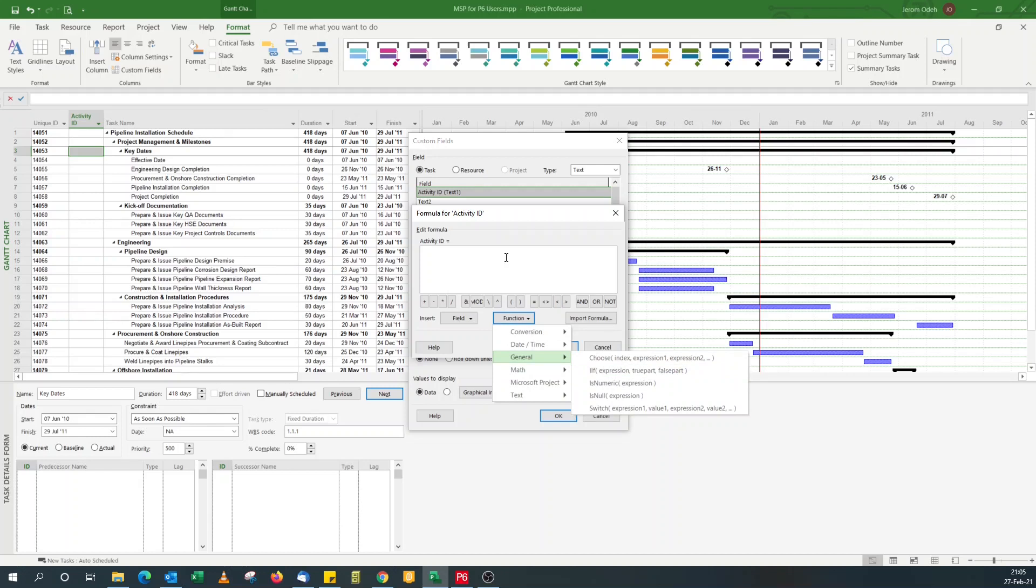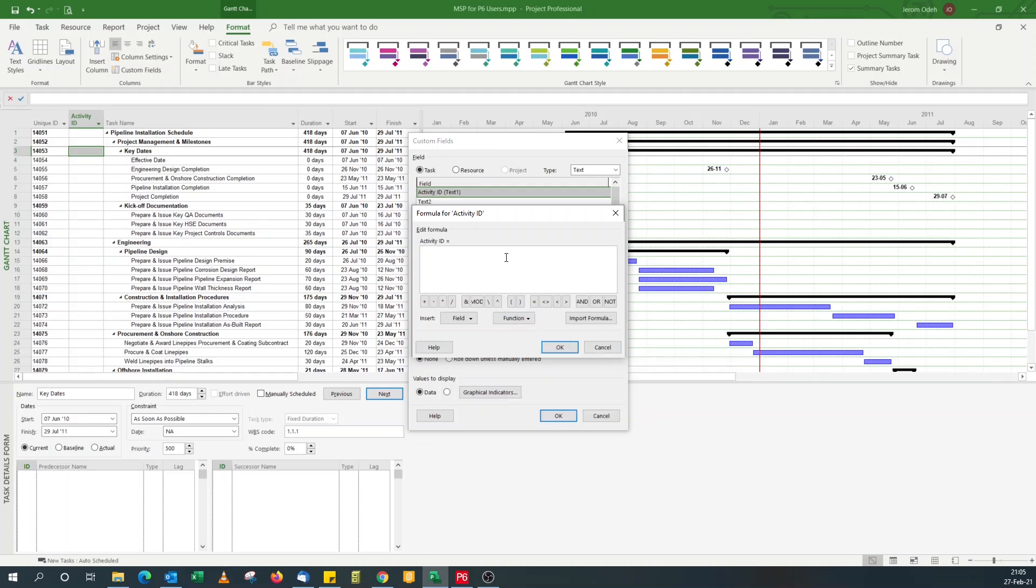If function, combine them with either outline codes or other custom fields to do it. For this tutorial, I'm going to keep it simple. Just one set of prefix to append to the unique ID field. But if you want a more complex one, you can get in touch with me and we can discuss how I can help you with that. So for this, I just want to append MN dash.